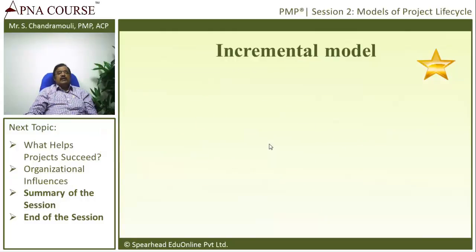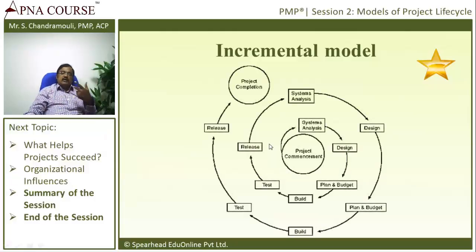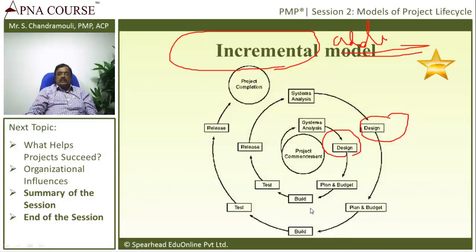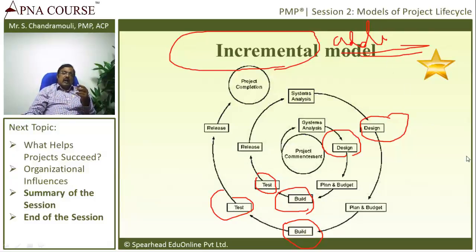Next is the Incremental Model. Incremental means addition of functionality, whereas in iterative we do the same thing again and again. In incremental, functionalities are getting added continuously. For example, in system analysis and design, the build phase executes multiple times — build, build, build — and the test phase also executes multiple times. Incremental means addition of modules being continuously added.